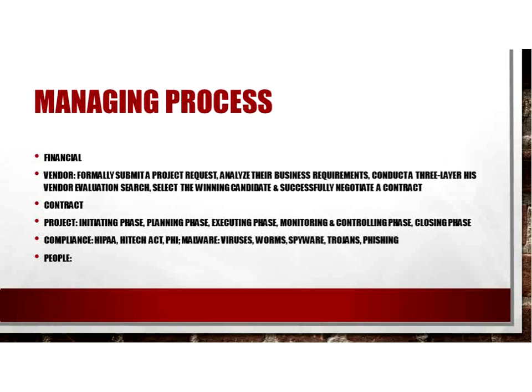One, build a case for the need for HIS steering by aligning your strategic business and HIS priorities. Two, establish a steering committee charter that outlines key tasks and important roles and responsibilities. And three, keep the HIS steering committee small and meet at least on a monthly basis.